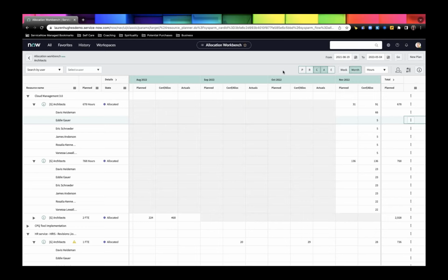Okay. Sorry, Lauren, back to you, just to clarify, availability and capacity. Yeah. Okay. Thank you, Luis. So if you're changing the schedule for resources, you're going to be changing their capacity, like Luis is saying. And then if you're actually allocating hours or days for that employee with a resource plan, you're going to be reducing their availability. But their availability is the total sum of how much capacity they have minus what they're already allocated for. Okay. Sounds good. Thank you. You're welcome. Looks like Jennifer also had a question.